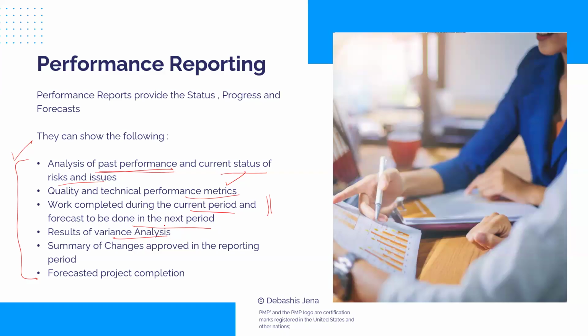Include statistics on changes. How many change requests were raised in all? Out of that, how many were successful, and which were not successful? How many were approved? How many are on hold? Which ones are rejected? We can include such stats.